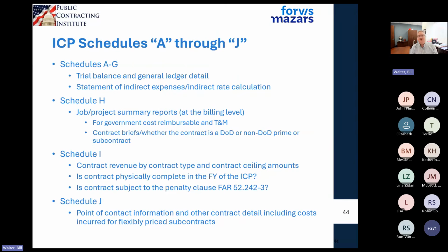It tells you these are my actual costs at the end of the year. Schedule I is kind of a recap. It says, okay, here's how much I've billed in the past. Here's what my actual costs were 2 years ago, my actual cost last year, my actual cost this year. And you can compare and see how much you billed and how much your actual costs are so that you know if you're ahead or behind. And if you do your accounting properly, and you evaluate it each year, chances are you're going to be okay with that.